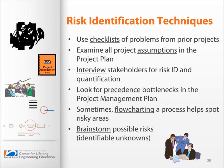When you're identifying risk, you can use checklists of problems from prior projects — I showed you some examples of this earlier. If projects are doing postmortems correctly, they should be documenting some of this for you. Looking at what happened in other projects is a huge benefit to being able to assess risk for similar programs.